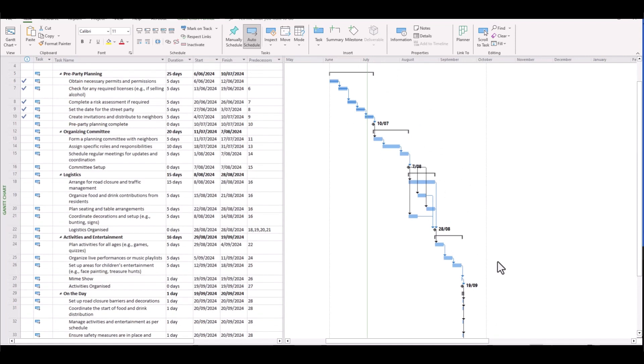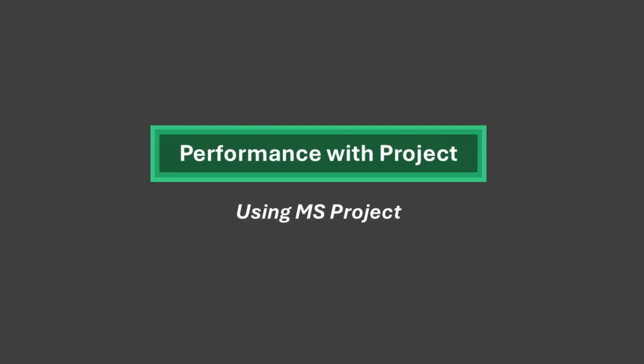Now, depending on the length of your project, if it goes over several years, you might consider quarters. For smaller projects, you may consider a timescale of weeks or even days. It's really up to you. But for a project like this, around that four to six month mark, I'd be comfortable in just using months as the timescale.